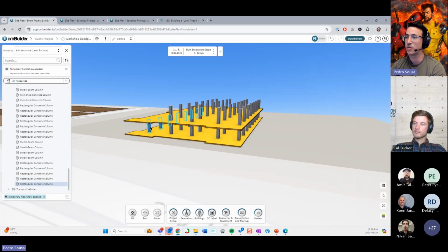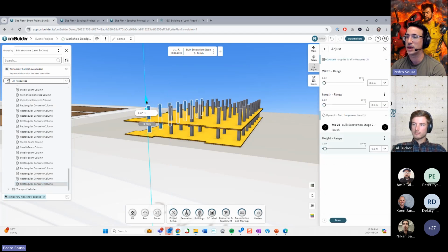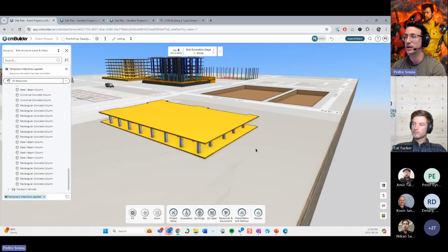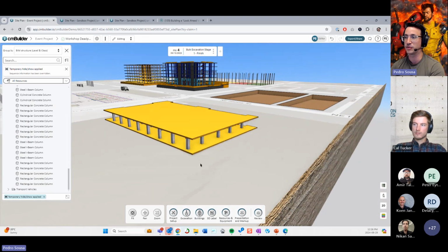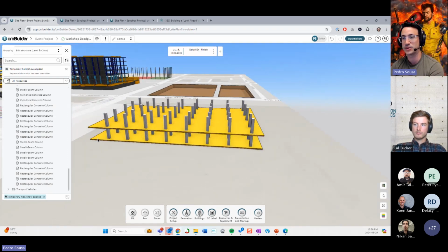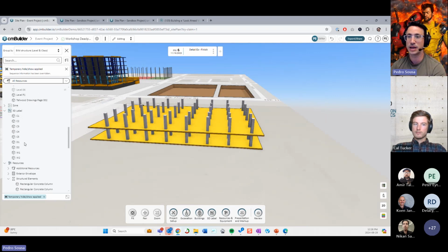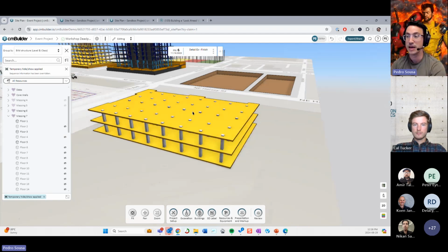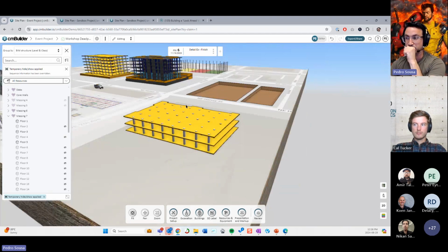And once you're done with it, you can now see that in the milestone prior, the columns will be just on the first level, and then when I advance to the next milestone, they go up, right? And then on the next milestone, I'm gonna come in here and show my next level, right? So it's just that play. You're just doing this repeatedly to create a sequence of execution for your levels, right?